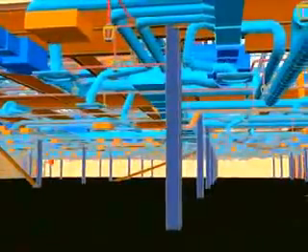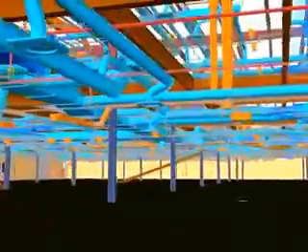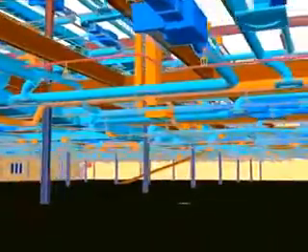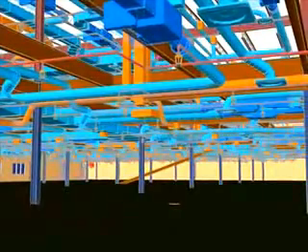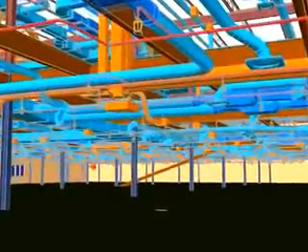Frequently today, project specifications call for coordinating drawings produced by the mechanical contractor prior to placement of fire sprinkler systems, ductwork, chilled and condenser water piping, and electrical distribution systems. This module's universal collision test will show crossing point collisions between trades.